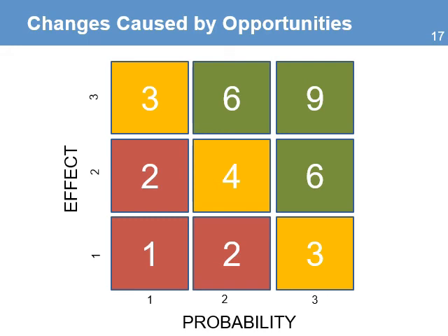Red, low index value. The probability and impact are low. It's better not to pursue this opportunity, but you should monitor in case the values change. Yellow. Probability and impact values are medium. It's an opportunity to consider, but maybe more analysis may be needed. Green. Probability and impact are high. This is a very good opportunity to take now. Changes will be made to exploit or enhance the opportunities.